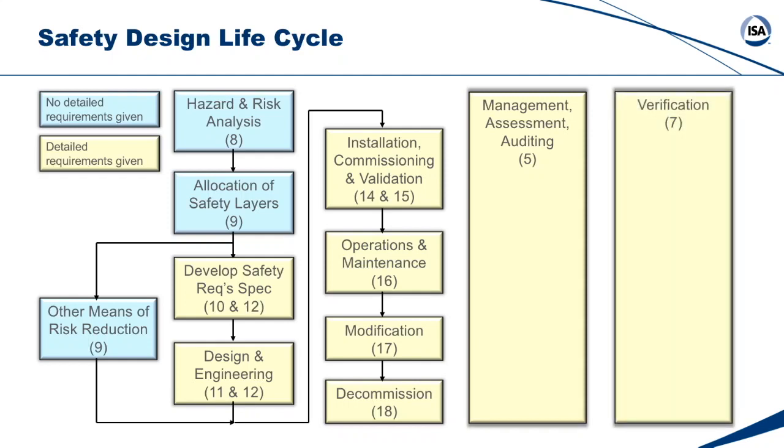Verification is different than validation. Verification is to make sure each and every one of these steps is done. It's done properly. It's done with the right people, that you have the right information or documentation to do each individual step or box shown, and that the team produces the right documentation that people downstream are going to need afterwards to design and build and operate the systems.